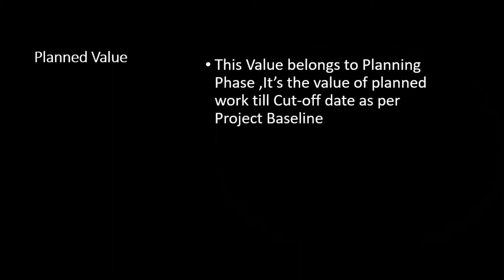Planned Value belongs to the planning phase. In project management we have phases: initiation, planning, execution, monitor and control, and closing. A helpful way to remember: Planned Value sounds like 'planned' — it belongs to the planning phase and is linked to the baseline you saved in Primavera 6. To calculate it manually, the formula is: Planned Value = Schedule Percent Complete × Total Value of Work.